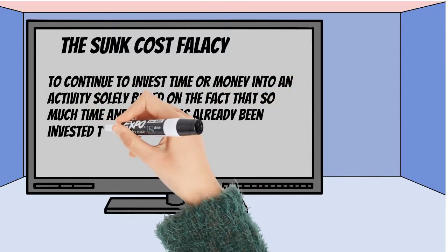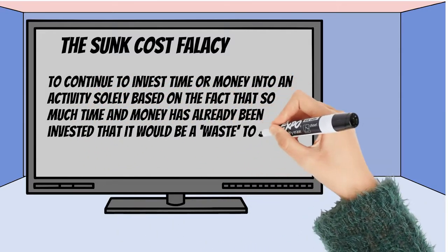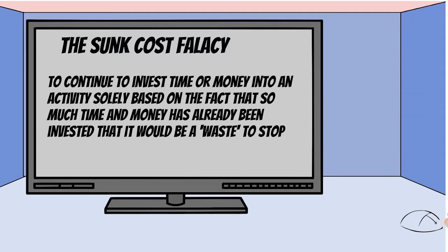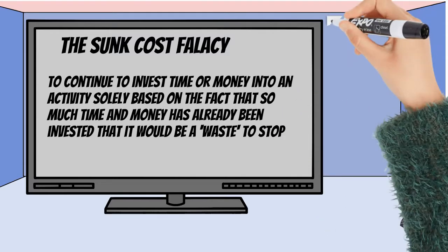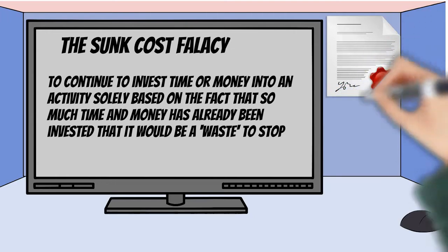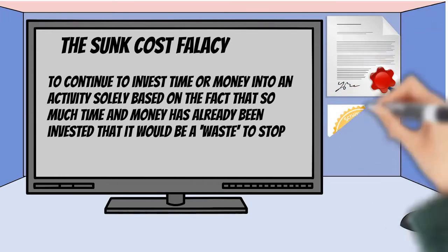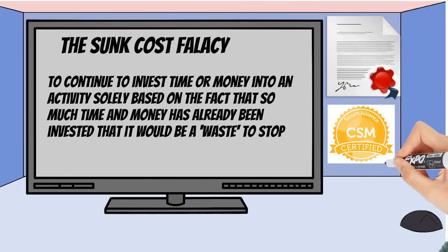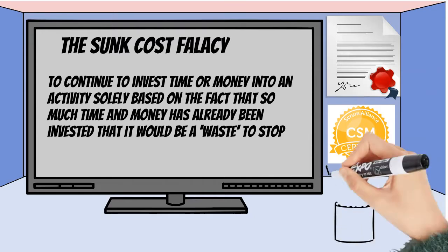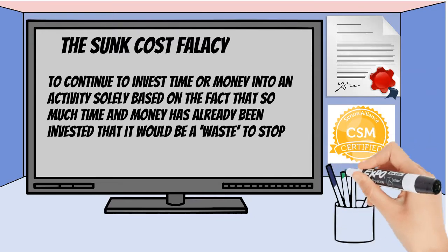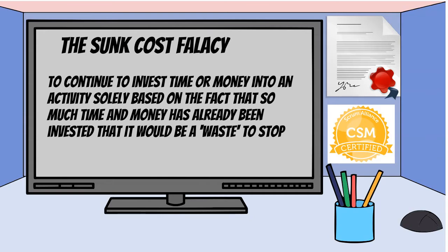If the benefit being delivered from completing that item is less than the benefit of any new item for a similar cost, then the sunk cost of the work already completed on that item needs to be put aside. Agile is about recognising cost versus benefit, so being able to ignore sunk cost is a critical skill. This incomplete work can still be flagged as an item for a future iteration, such is the beauty of maintaining a persistent product backlog.